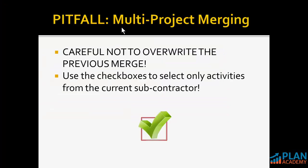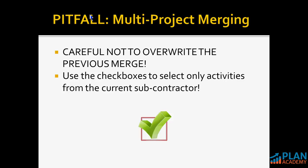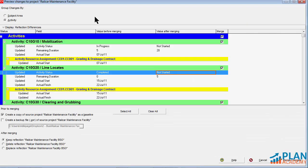Pitfall. When we're working with multi-project merging, we need to be cautious that we do not overwrite the previous merged information. That's exactly what's happening in this situation. We're overwriting the ACME projects updates with non-updated activities from this BSO project. So this is where those check boxes come in handy here. I have that we need to use those check boxes to select only activities from the current subcontractor.